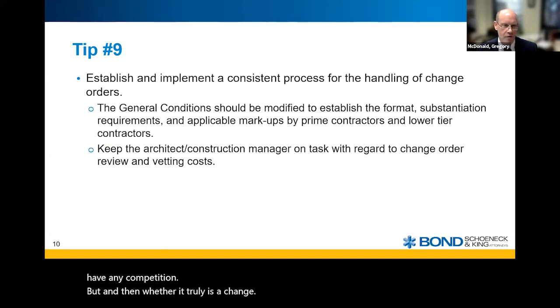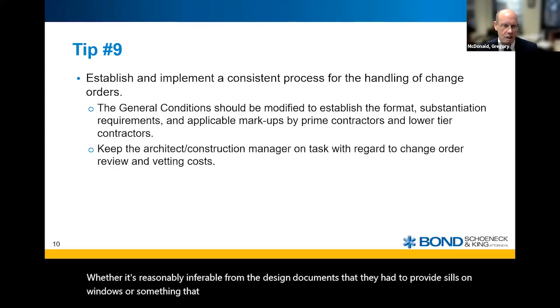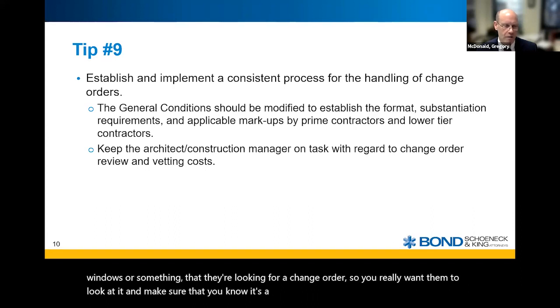Whether it's reasonably inferable from the design documents that they had to provide, sills on windows or something that they're looking for a change order. So you really want them to look at it and make sure that it's a legitimate cost that they're entitled to additional compensation for.